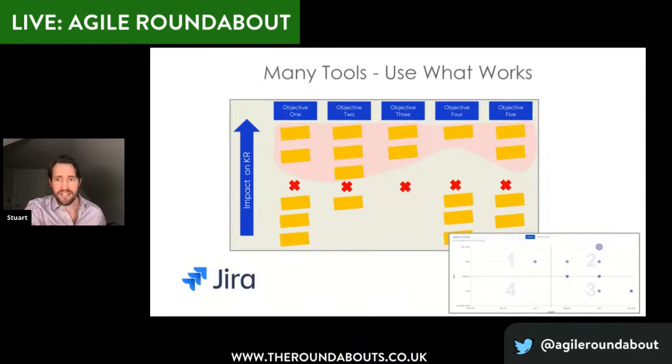for the business. So the original challenge was how to bring some understanding of when we would see impact at this high level. Obviously, this is before solutions were understood, estimation was done, or anything like that. So we actually ended up using what we'd call mega sprints, which is a quarterly sprint, to give a really good indication to some of those stakeholders and the leadership team of what we were going to be achieving, without necessarily committing to those kinds of tight timeframes.